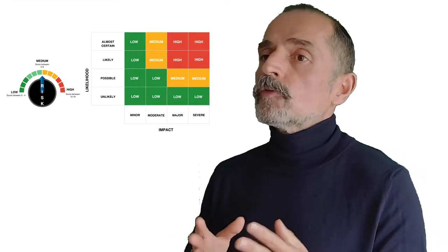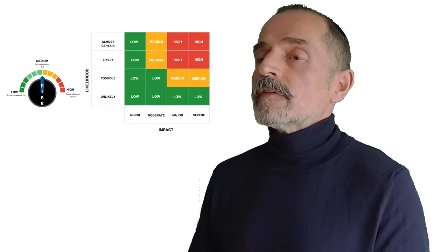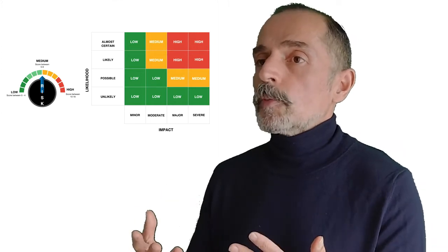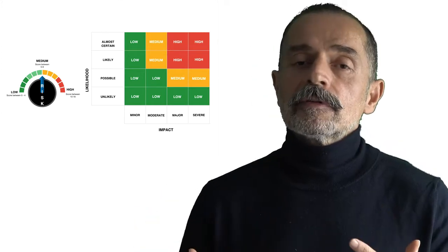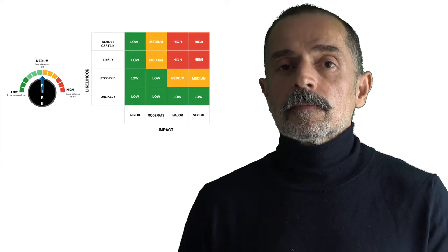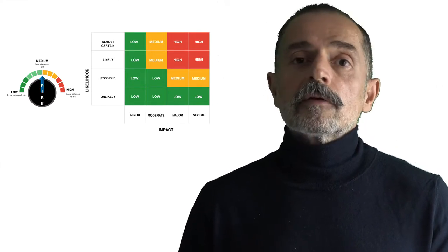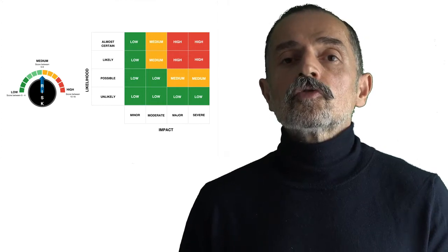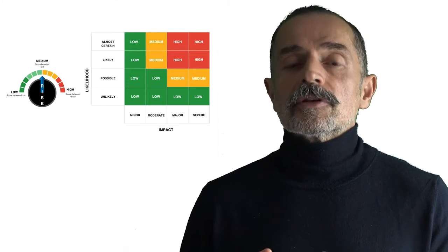The same thing happens with risk mitigation activities. They are the activities that we add to our project if the risk is confirmed and we have to mitigate such a risk. Don't forget that risk mitigation activities should also be budgeted.